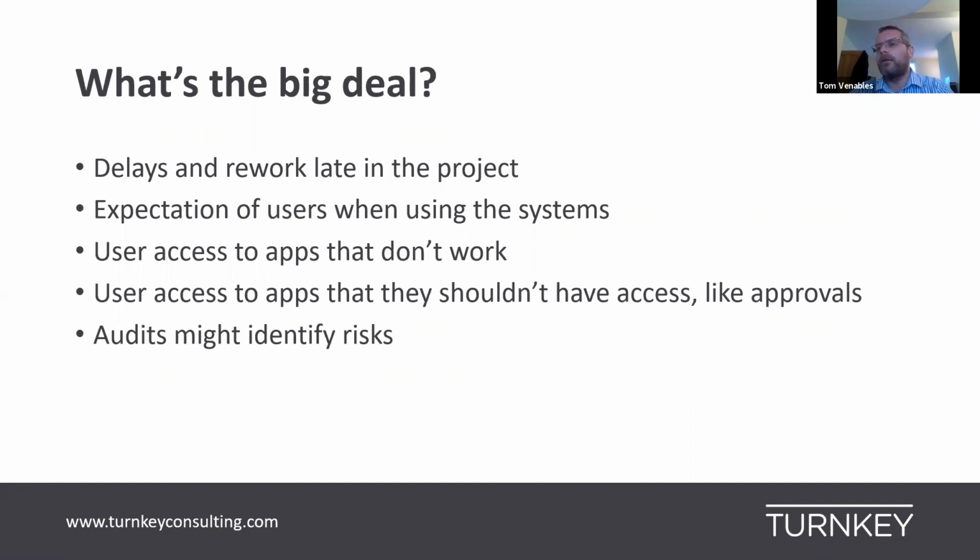If UAT isn't scheduled until 2 months before go live, and that's the first time you're exposing any security challenges or user experience challenges, then again, you've got to go back, you've got to redesign, you've got to retest. You've got to meet the expectation of the users. If they have been sold that it's going to be easier and they don't need as much training and there's only one way to do a process where before there were 6, you need to meet those objectives. They're going to be key to your success criteria for your S4 implementation.